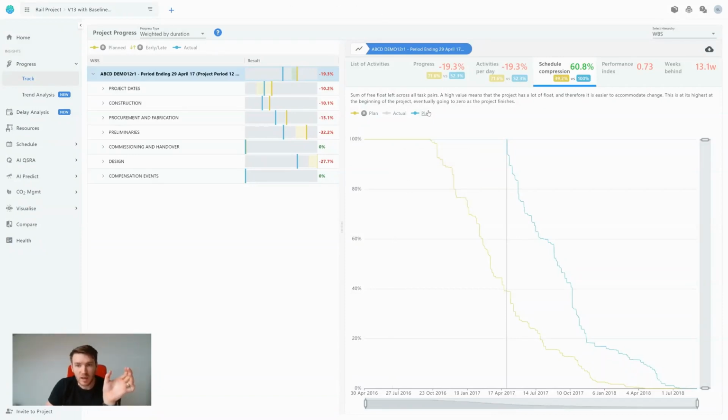So if the plan is below the actual, what that means is the milestones are moving out faster than the delay is happening in the project, if there is a delay. If it's the other way around, where the blue line is below the yellow line, it means the milestones are being held constant and the delay is crushing towards those milestones. That is indicative of a problem. This is a great sense to see if the schedule is being manipulated. If, for example, a team is saying we will hit those dates, yet are delayed in everything they do, this would give you an instantaneous view of that.